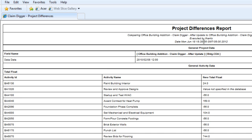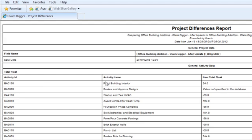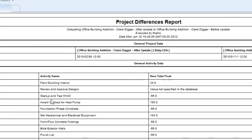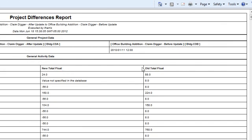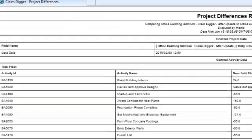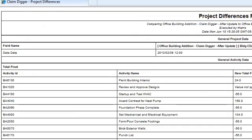Over here to the left, I can see the field name that's being evaluated. I can see the activity and the activity name. The next column shows me the data in the revised project, and the column to the right is the data from the original project. So I'm basically seeing those activities that have had a value change.